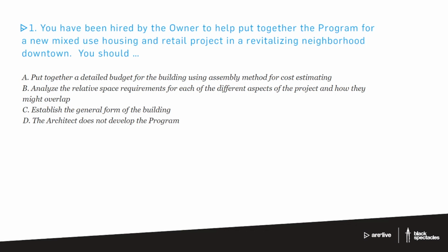In fact, the program is typically brought to the architect along with the survey, geotech information, some budget information, some other things like that, some environmental reports maybe. That's what the owners, the clients, will hand to the architect in order for them to figure out what their fee is going to be, how they're going to do the project, how long things are going to take. It's hard to imagine putting together a fee if you don't have the program, if you don't know what the building is supposed to be. So the contracts actually specifically exclude the program from the work of the architect. There is, however, a spot where you can do it as an additional service. It's clearly located, and if the owner checks it off, then you are being paid to develop the program.